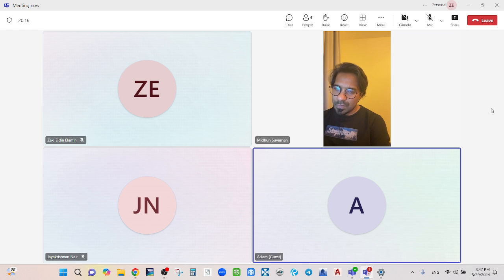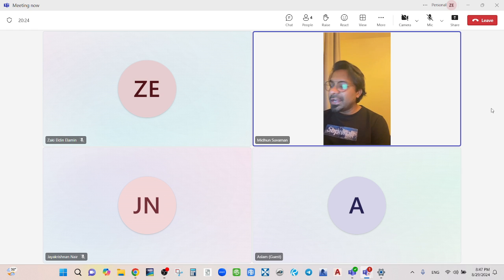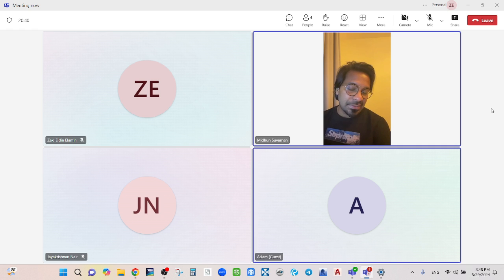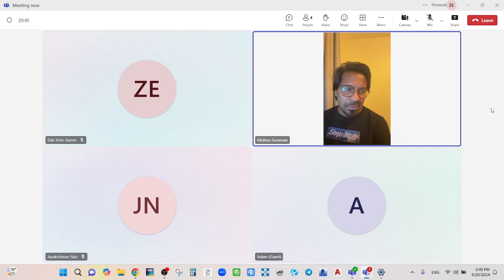In that case, only two parties can give a guarantee. Like, a security check is also a type of guarantee? We cannot consider it like that. In a guarantee, it needs to have all the elements of a contract. A security check doesn't have any element of a contract. The first definition of a guarantee is a third party giving surety for the work or performance of a second party. Here he's not giving a surety, it's just a check. If you deposit it, you may or may not get money.